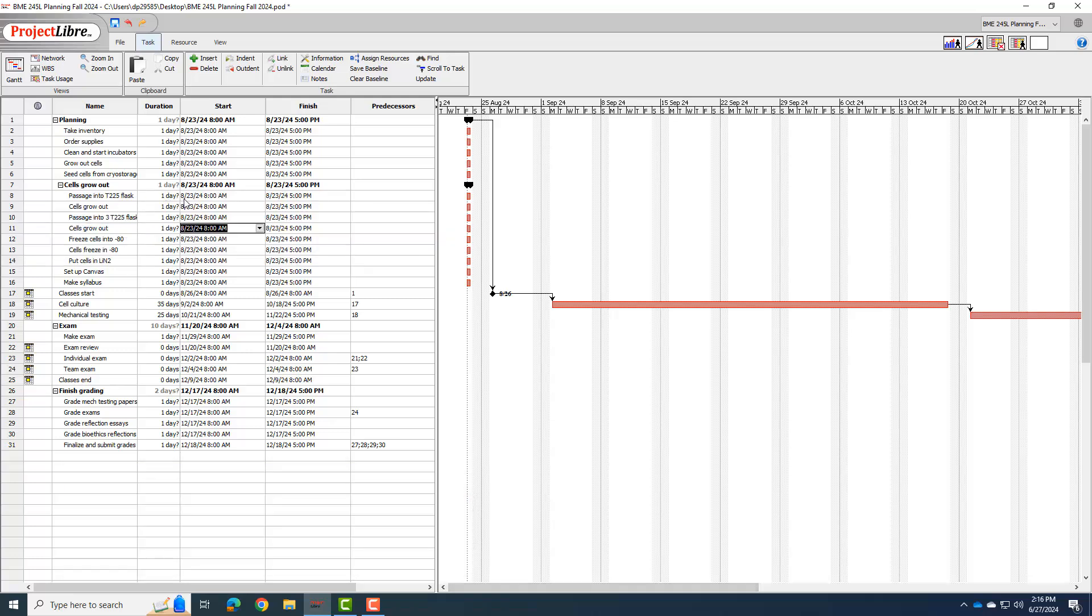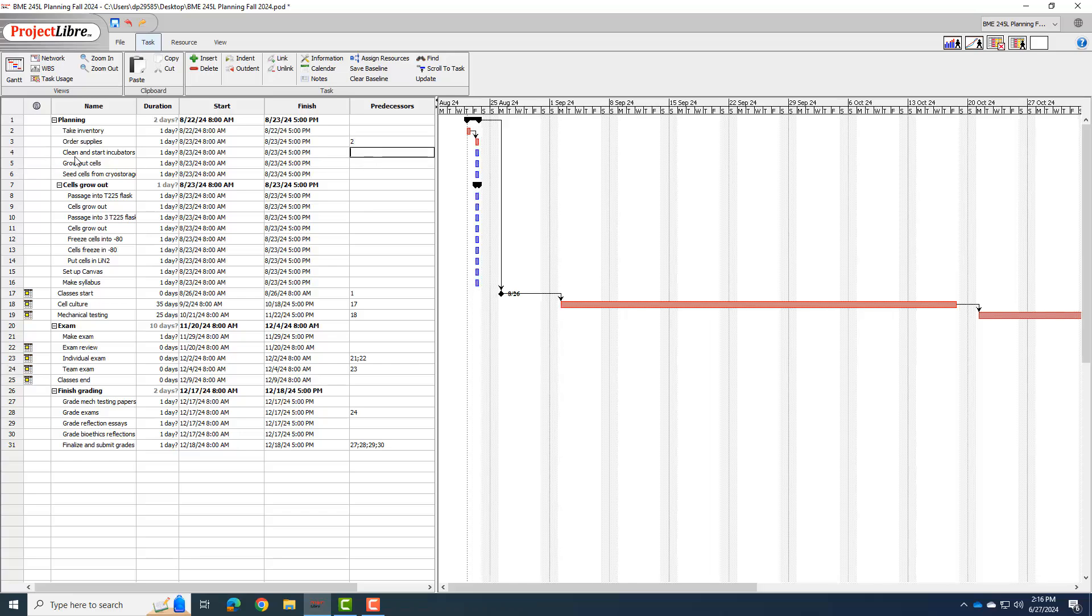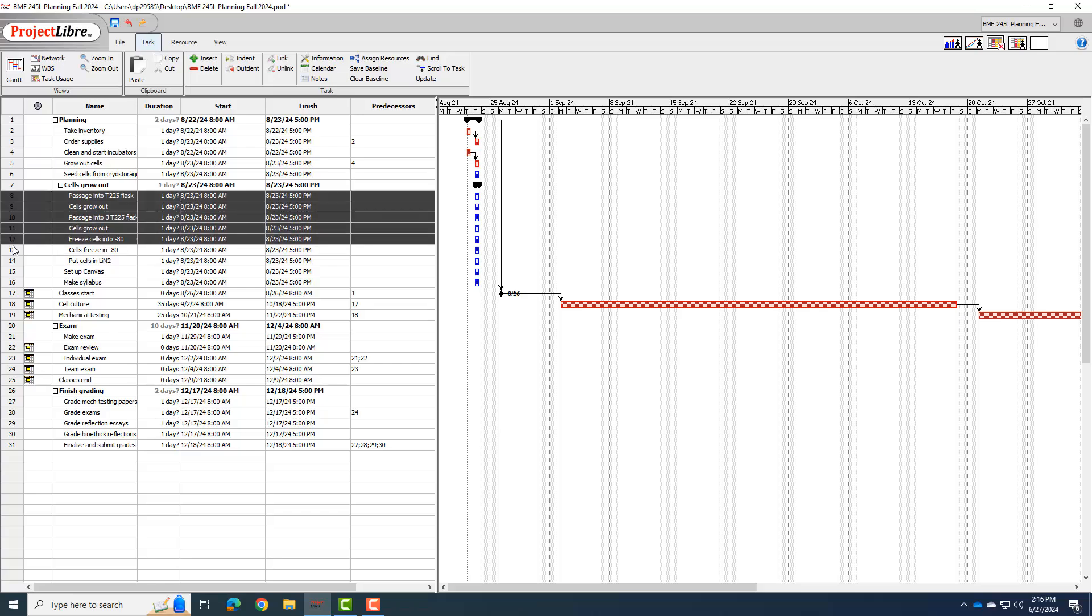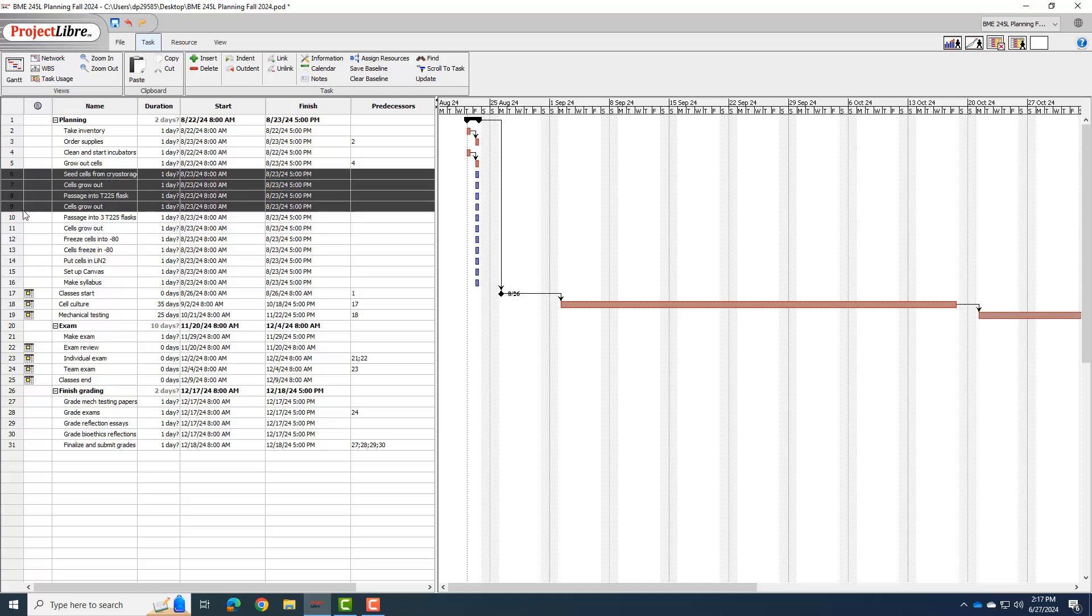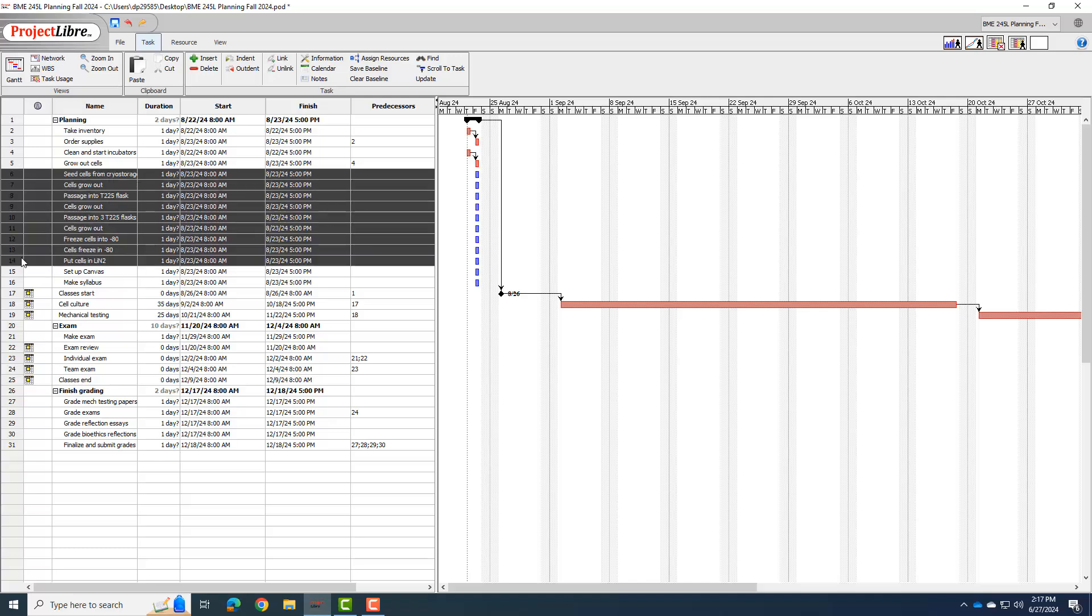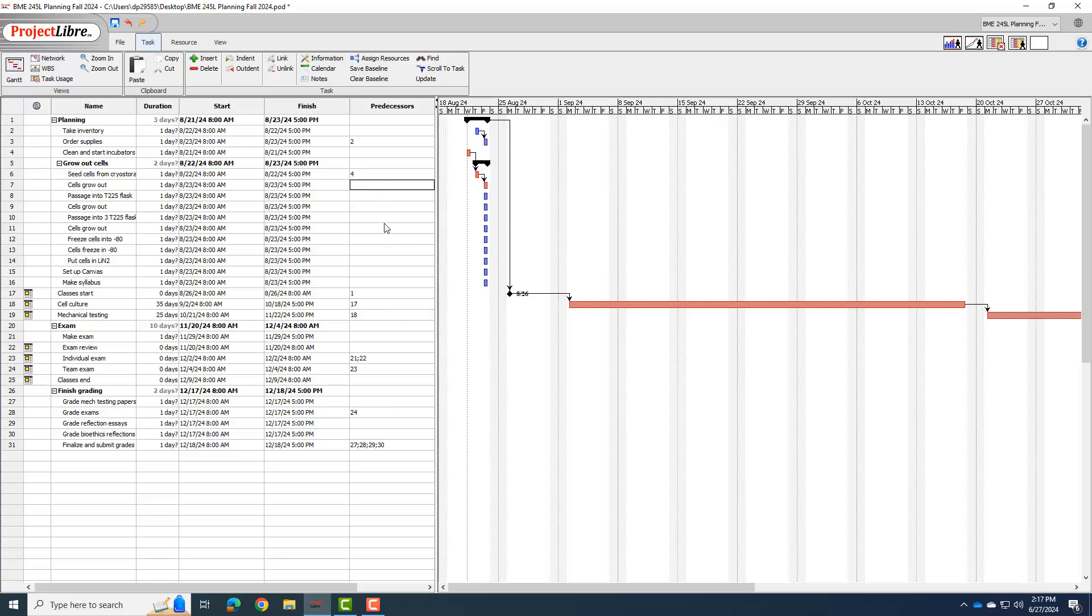And now I want to make sure I set my predecessors to make sure things happen in order. So in other words, before I can order supplies, I do need to take inventory. So that row two is a predecessor before row three. I can clean and start incubators wherever, but I cannot grow out cells until I've cleaned and start the incubators. So that's got to be a four. So I see I screwed this up. So I'm going to unindent all the, I'm going to fix it by unindenting all those. And I need, that's my problem for using the same language almost. I'm going to indent right there. And so I'm going to put this, I can't seed cells from cryostorage until I have started and clean the incubators and BSCs. And now I can put all these predecessors in.